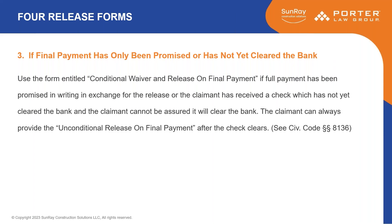You're going to use the form called 'Conditional Waiver and Release on Final Payment' if full payment has been promised in writing in exchange for the release, or you received a check but the check hasn't yet cleared the bank and you don't know if it's going to clear.